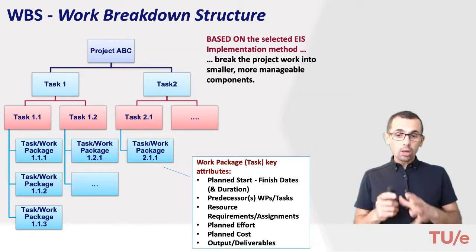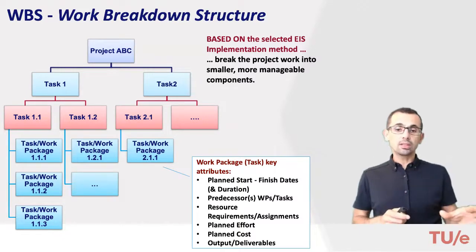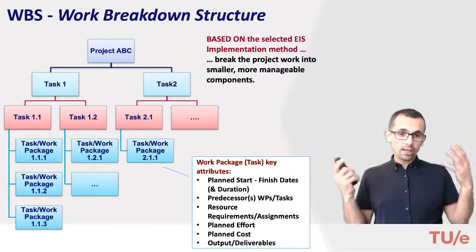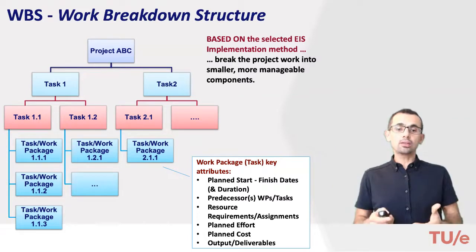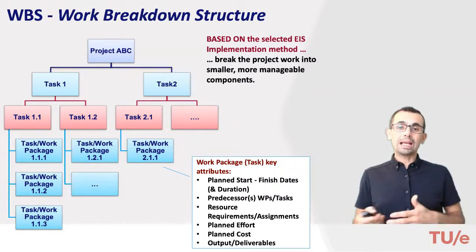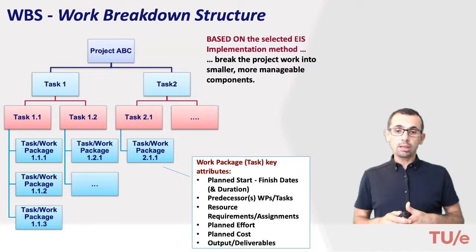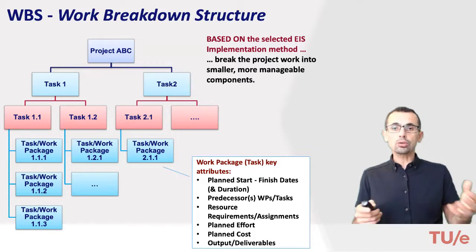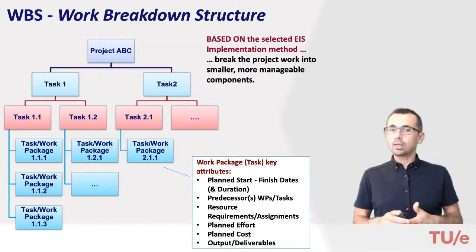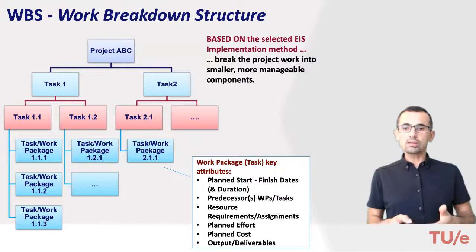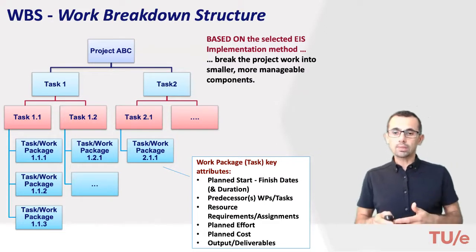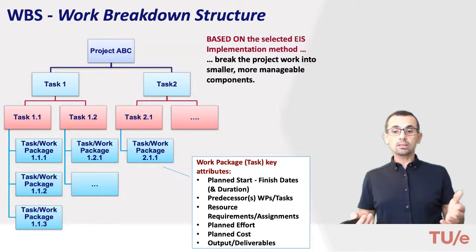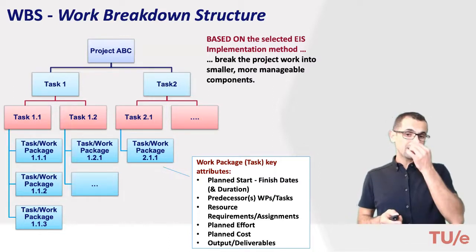If you know how long a specific activity is planned to take, if we have also planned the resources, then we can already know the planned effort and the planned cost, in fact, in many cases, because it's very human resource oriented planning that we're doing. We're not using, in many cases, raw material or something. So that's it. That is for the planning phase.